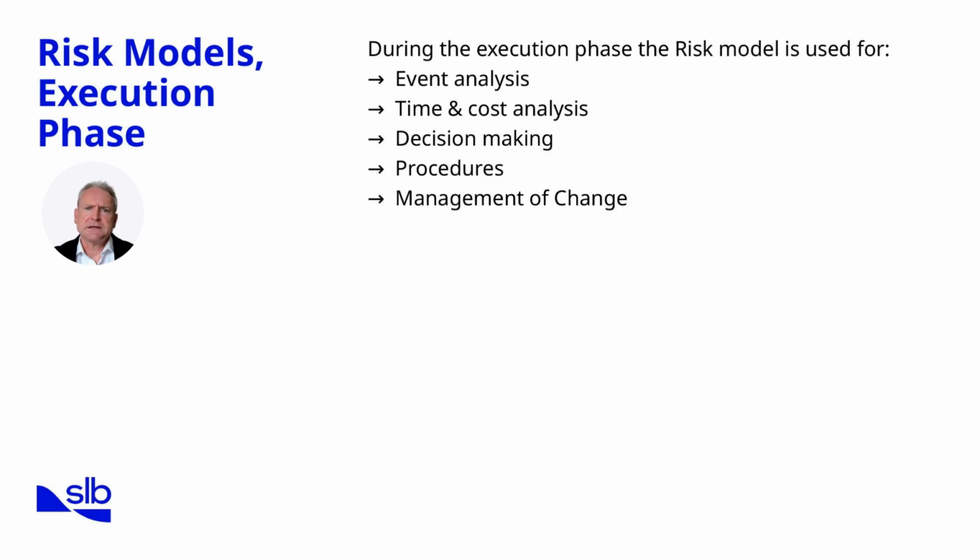Time and cost analysis becomes central in execution. Every decision, whether to continue drilling, to pull out of hole, or to sidetrack, has financial implications. The risk model gives us a structured way to weigh those trade-offs quickly and consistently. Decision-making in this phase also relies heavily on management of change.